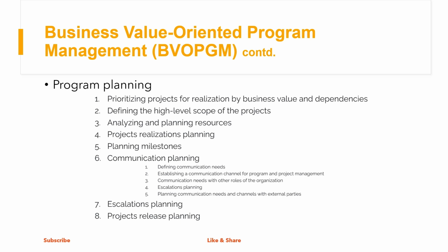Planning milestones. Important events may need to be defined, described, and scheduled. Such events may include gathering requirements, scope finalization, approximate time for project initiation, design phase initiation and completion, development phase initiation and completion, releases of product samples, testing or validation phase initiation and completion, repairing defects, initiation and completion, acceptances, initiation and completion, major releases and deliveries, marketing campaigns.